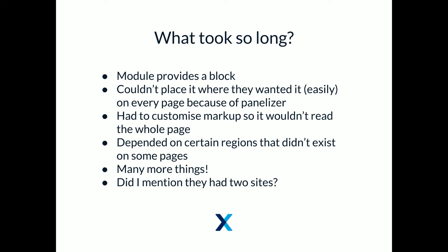Why did it take so long? Well, a lot of reasons. I could talk a lot about what went wrong in this specific example, but the module provided a block. They wanted it to be under the header, not in the header, and we were using panels and in-place editor, so we had to write this crazy update hook that moved the block into the right spot on every single page. That was one of the things that took this request totally off the rails. And then also, there were actually two sites that we had to do this on, and I highly doubt that was factored in.